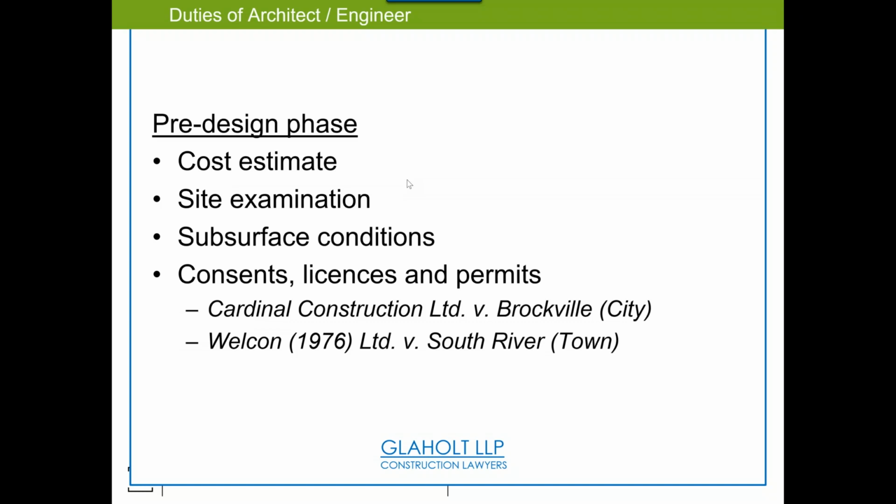There's a difference in the as-built that's produced by the contractor, and the terms all get convoluted depending on what jurisdiction you're in. So the contractor can produce as-built representing what they built. As an architect, I would produce what my association calls a record drawing, but the engineering association calls it as-built as well, but not the same as a contractor's as-built. That would be, I take my design drawings and I update the design information to reflect what was built. And I make that distinction because that's using design information, not the LOD 400 stuff that the contractor might be playing with, but my 300 or less stuff reflecting what was made.